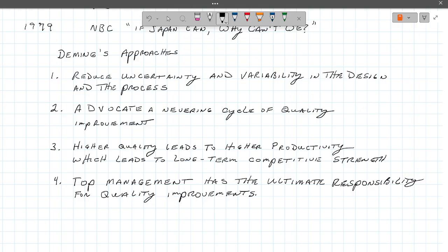They're ensuring that when that connection weld is made between some connection points for different beams and columns, that it has been looked over, or ultrasound testing methods to actually do it. Don't do destructive testing because that would just ruin the joint. But it's important that management wants to have responsibility for that and actually do something about it.